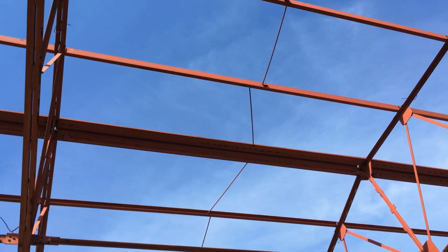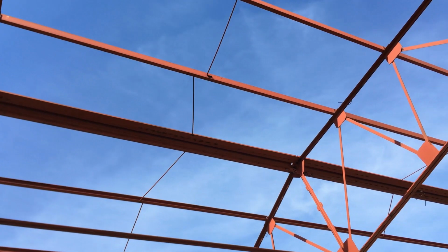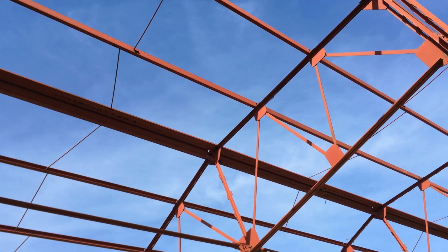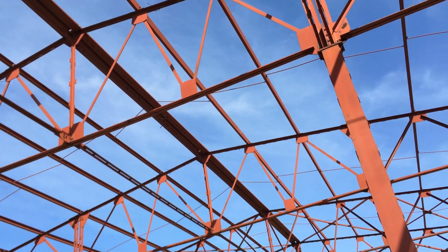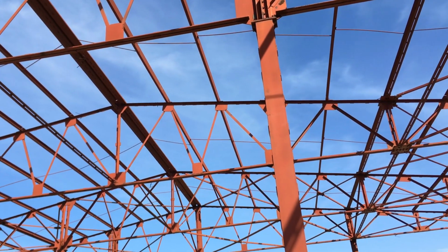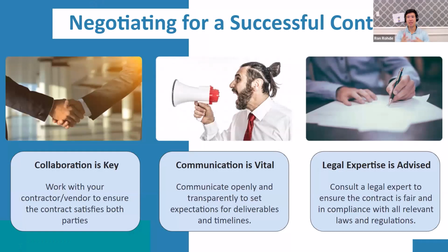There's a lot of stages of this truss manufacturing from these metal building guys. Has the steel been ordered? Is it shipped? Is it on site at the plant? Have they cut? Have they measured? Have they welded? Have they put these together? How many have they put together? When is it going to go on the truck? Has it gotten on the truck? When is it going to be shipped to my site? And when does it arrive on the job site?